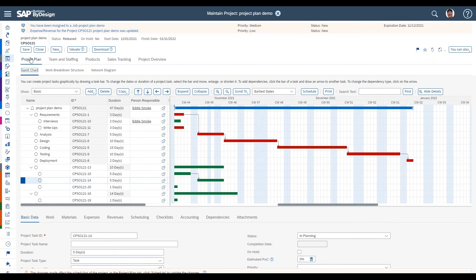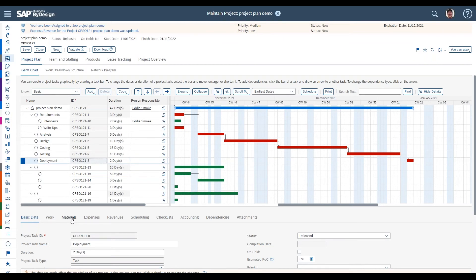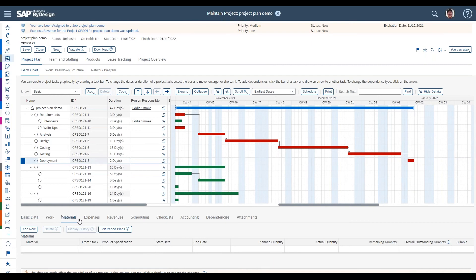The next area is the Materials tab. For example, in a software project where you need to install on hardware, on the deployment task you might know in advance there are certain hardware components needed — either procured from an external supplier or taken from your own stock. The materials tab of a task is exactly where you put in planned materials, in the same way that on tasks you plan work by service type and hours of effort.